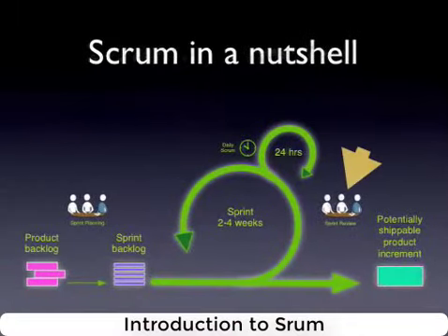So let's get back to our process. I forgot to tell you before, so I will do it now. Sprint length is an important factor. Usually, the sprint length in Scrum literature is said to be between 2 and 4 weeks. And this is really true from our experience. We started with 4 weeks, then we went down to 2 weeks, and now on one project we are even doing 1 week sprints. And from what I know, the general practice is indeed that the sprints shouldn't be longer than 4 weeks, and for web development, 2-week sprints work very well.